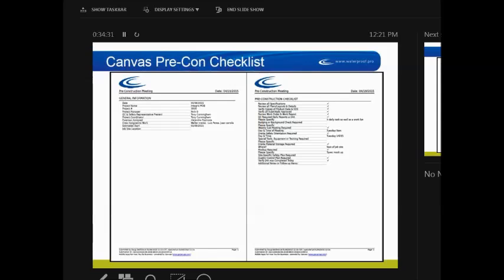I'm going to go through some of these. Verify all specifications. There are some projects that require end dams, or special terminations. Read the spec for the scope of work you're going to be performing the next day, at a very minimum. I know there are air barriers that we start in 2 months from now, but if you're doing below-grade waterproofing, read the spec, or somebody from that pre-con needs to read the specification for that scope that you're going to install. Otherwise we're going to miss something important.